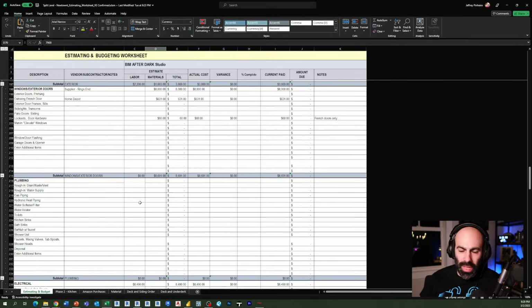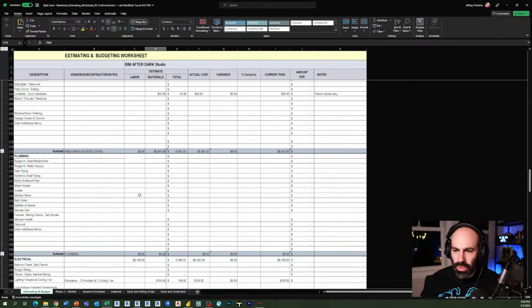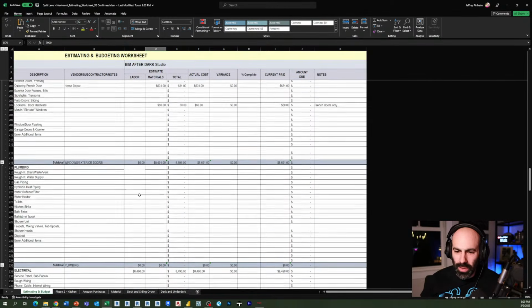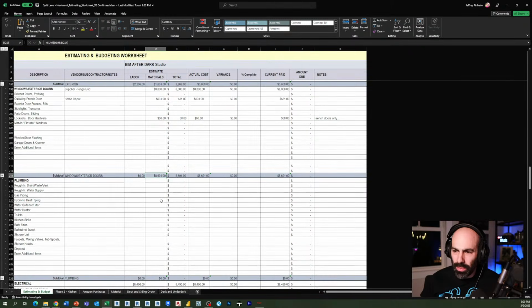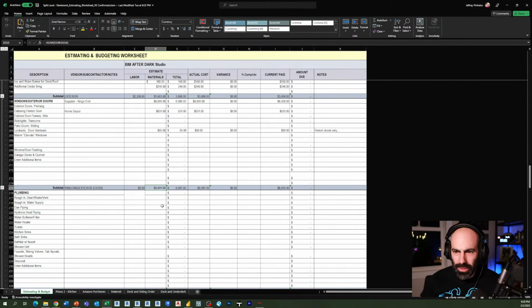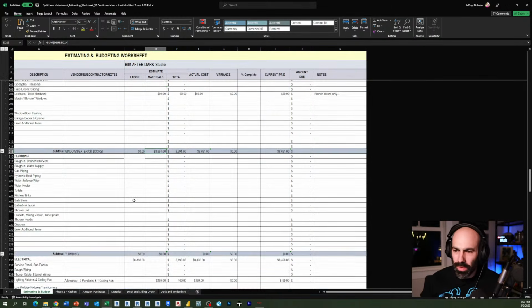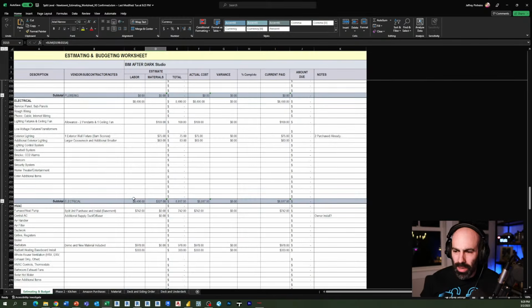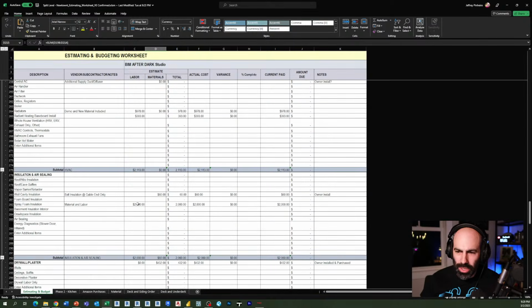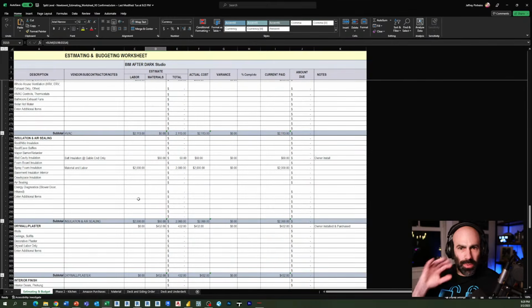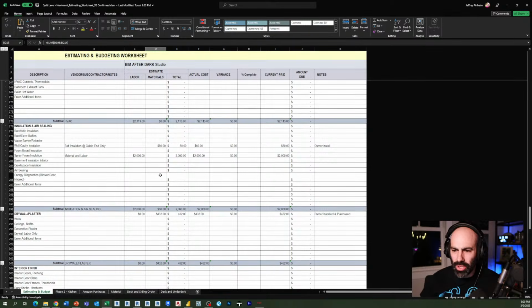Windows and doors was something I had hard numbers for, because I called the local supply and had to order those basically immediately. For all the Marvin Elevate windows and doors, it came out to around $9,000, give or take, and that's including the French door interior. Electrical was about $8,500. HVAC was pretty simple, just tacking on one supply essentially.